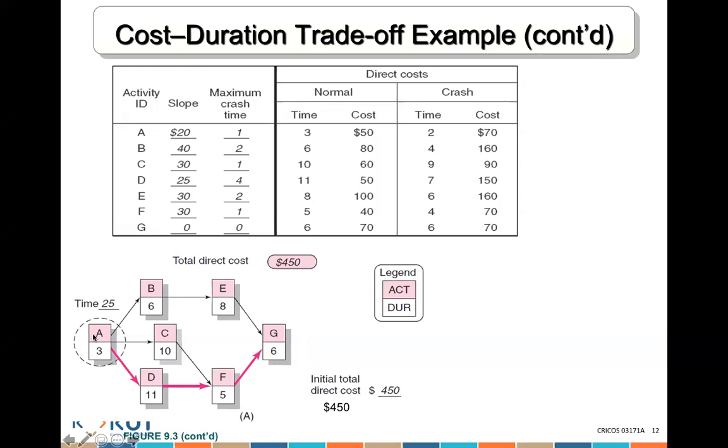Does that make sense? So the longest period is always what we consider the critical path. Because if you remember, think about it this way. If you're building a house and you're building the garden, if your house is going to take 4 months and the garden is going to take 1 month, if you finish the garden in 1 month, it doesn't mean that the actual house is finished. So your project is not finished. People can't move in the house because they still need to finish the house. There's still 3 more months left to finish the house.